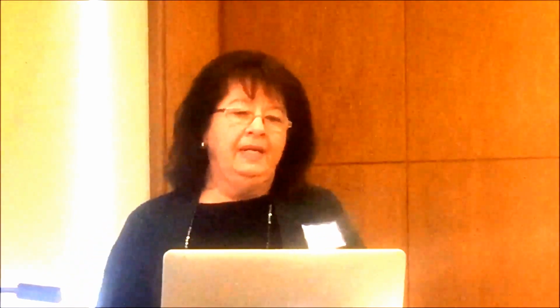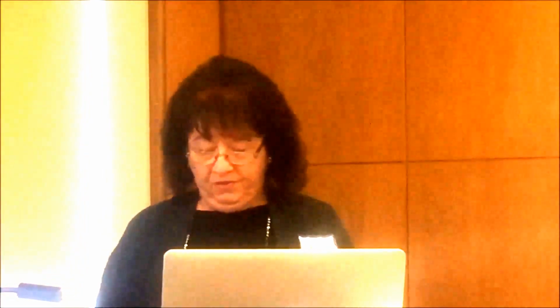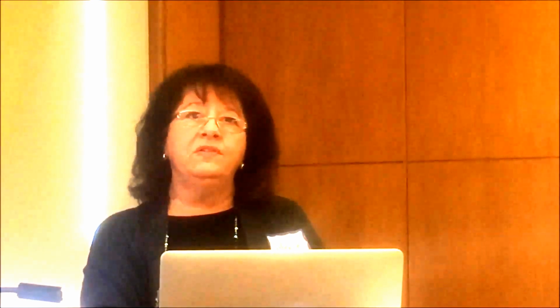So we were also, as I said, in operational mode. What we realized was our staffing plan was inadequate. That was during our storming phase. We had to scramble with the budget to try to get vendors and consultants extended. We tried to pare back on requirements and scope as much as we could. We did have the backlog, which facilitated that.